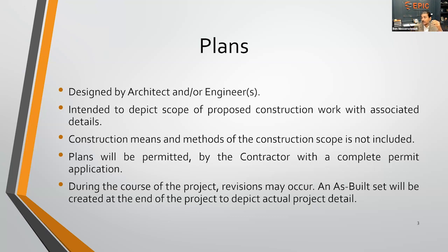Those several different sets are going to be really different revisions during the course of the repairs, during the course of the project, whether it be material selection or increase in scope, or value engineering, which is a loose term of reducing scope or swapping out materials, typically for more economical ones to fit within a budget that the owner may have or the client may have.